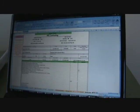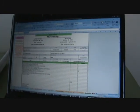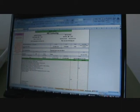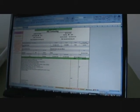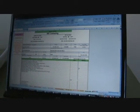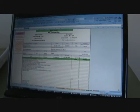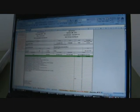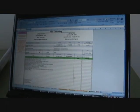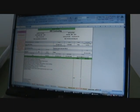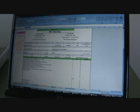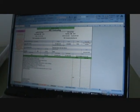Work order is the next sheet. This is designed for your men. It gives you the scope of work without all the prices. At the bottom, it does have some costs. If you want to give your guys costs to have targets for labor costs, material costs, so they don't go over budget. But you print this up, give it to the guys when they start a job, and it gives them the scope of work and some targets for costing. Next sheet is a...